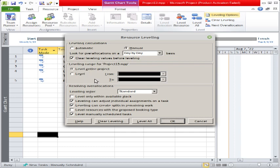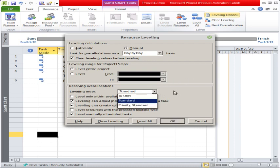The 'Labeling range' option gives two choices: either level the entire project — meaning if there are 40 tasks the software will level the overall project and resolve all over-allocation issues — or you can select a date range from and to, and it will only level those tasks that fall within that particular date range.